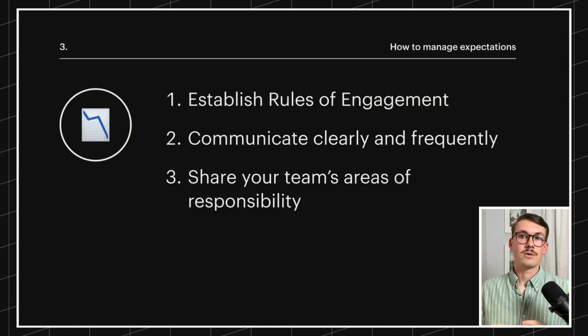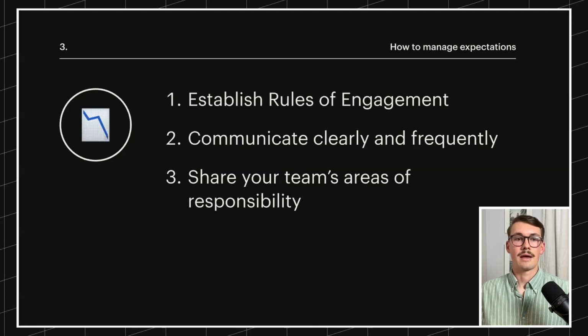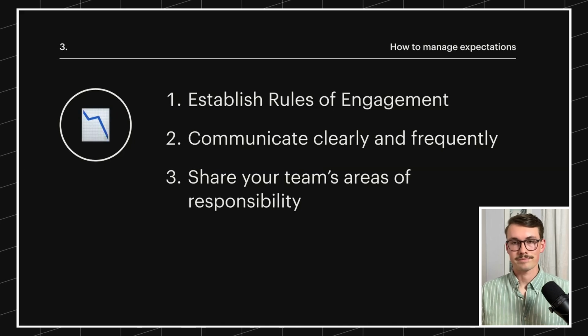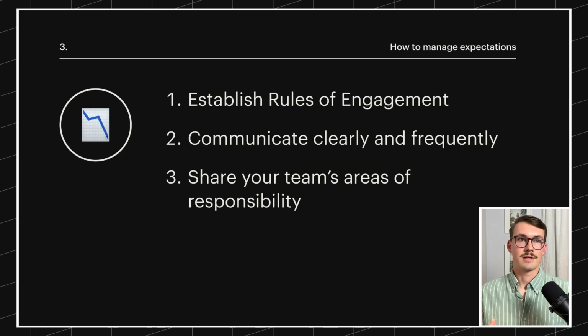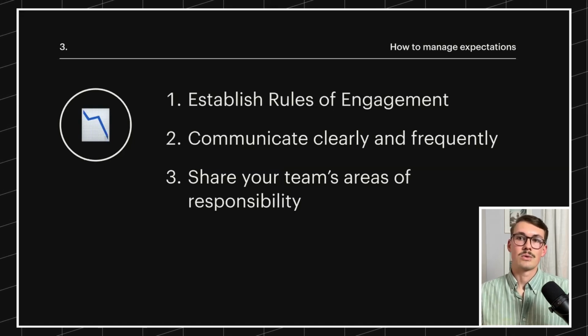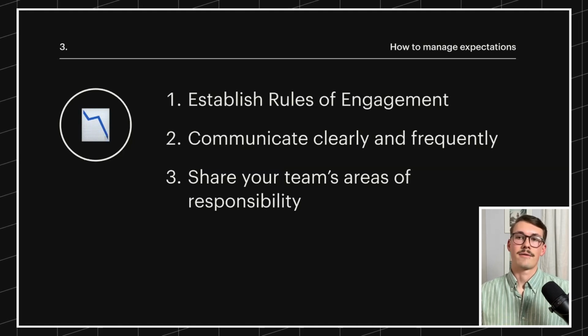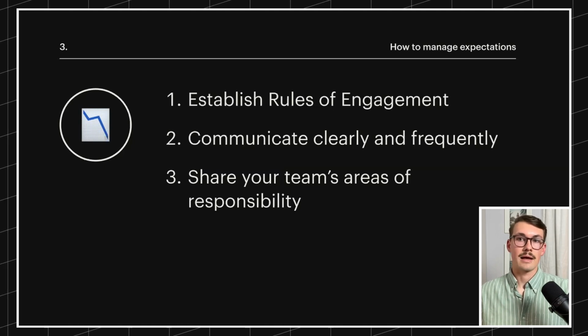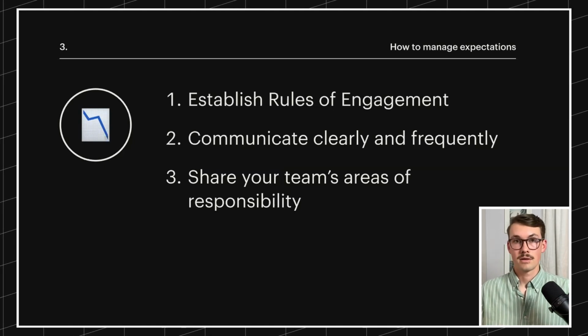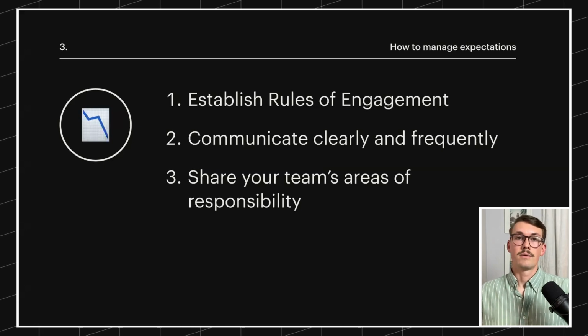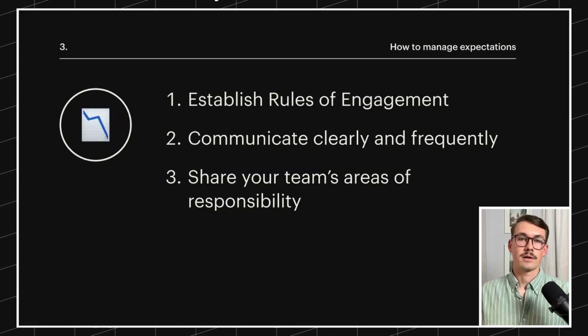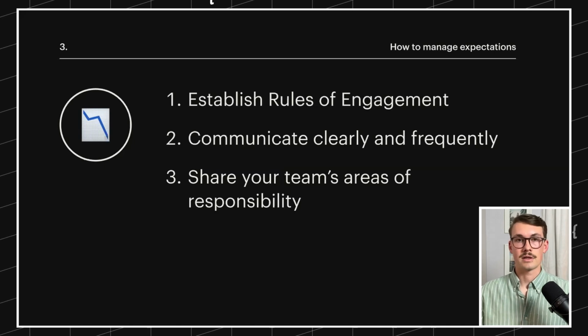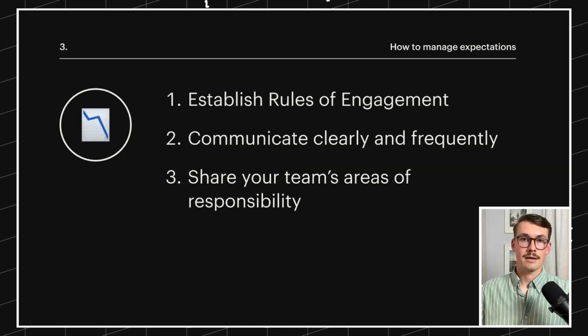The next thing to do is communicate clearly and often, or frequently. I think this one's kind of obvious, but it's also something we forget about from time to time. So this comes back to cadence. We've found at Finsweet that either daily or biweekly updates through Slack are helpful for most of our clients. So this is what fits the bill. This is kind of the practice that we hold with most of our clients. Now, some, like the client I was just explaining, might need a daily stand-up, and that's okay.